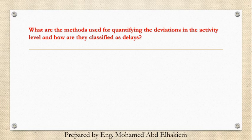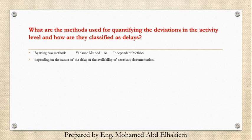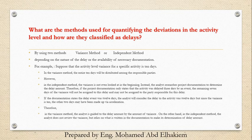What are the methods used for quantifying the deviations in the activity level and how are they classified as delays? By using two methods: the variance method or the independent method, depending on the nature of the delay or the availability of necessary documentation. For example, suppose the activity level variance for a specific activity is 10 days. In the variance method, the entire 10 days will be distributed among the responsible parties. However, in the independent method, the variance is not even looked at in the beginning; instead, the analyst researches project documentation to determine the delay amount. Therefore, if the project documentation only states that the activity was delayed three days by an event, the remaining seven days of the variance will not be assigned to this delay and may not be assigned to the party responsible for this delay.